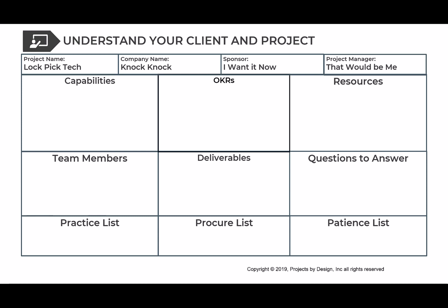So what this tool does is allow time reporting at that MMP, MVP, MBI level, so that you're not down in the granular detail, but you can associate the cost of that MBI, so that you can compare that to the benefit you receive. And that's why I went into partnership with them to share these sorts of things within that context.